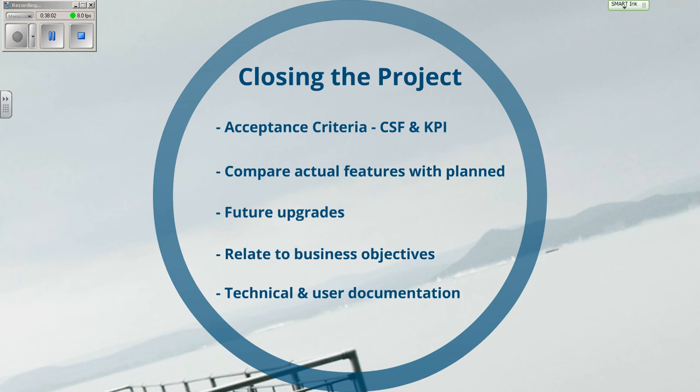If there is an administrator password for the system, you don't want them calling you up to ask for it in a few weeks' time. Or something like disaster recovery instructions, as well as backup instructions. So if something bad does happen, they don't call you up and say, "How does our backup work?" They should be able to refer to the manual that you've written, which tells them specifically how to do it. Or you could say, "Well, we can help you with that, but it'll cost you £500 an hour." Ideally, of course, that would all have been agreed at the start as part of the project proposal.